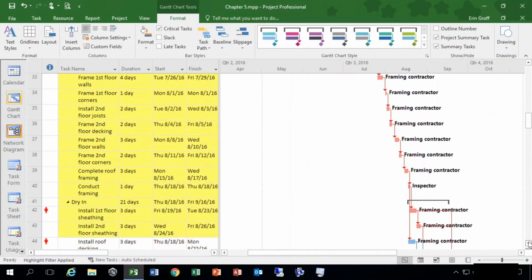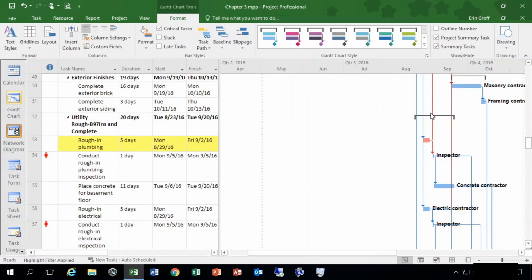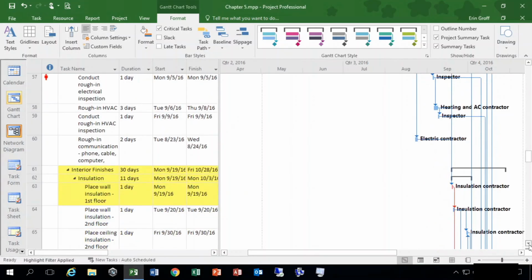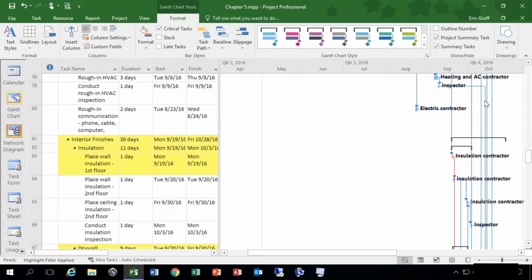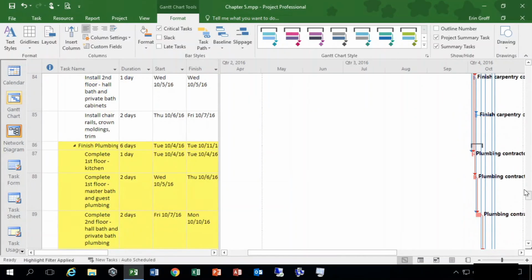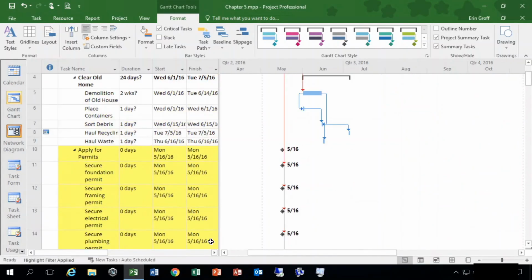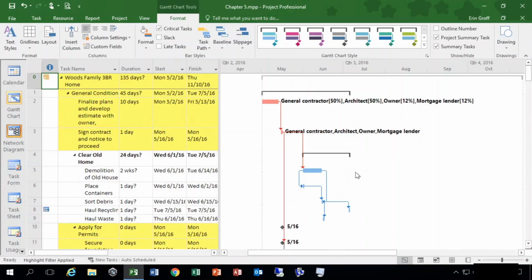and this is what drives the end date for your project. Taking in the total durations of all your critical tasks will give you your full duration of the project plan. Anything that's on the blue line is not going to affect your end date in any way. Because again, they can be occurring at the same time as other tasks, and they will not affect it. They go off again on little tangents on their own, and eventually end before the end date. So they do not have an effect there. So this is an example of how to highlight your critical tasks and highlight your critical path in your Gantt chart view.